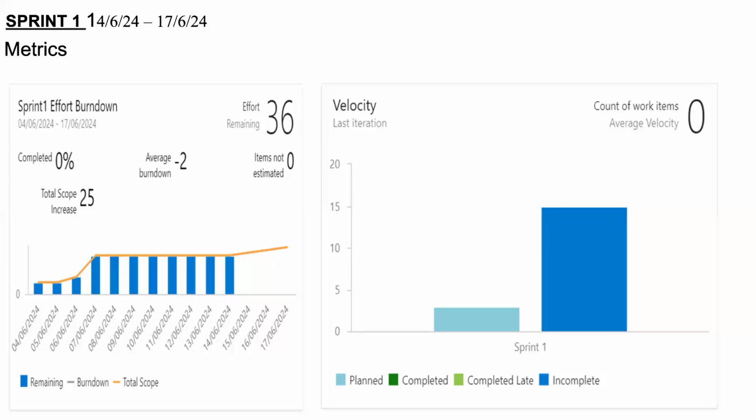As we can see, the effort bundle shows that the new PBIs were planned during the sprint planning, and more were added to the PBIs along the line in the sprint, but none was completed. This was because SMs were the developers and were new to the environment. The velocity chart shows that few were committed and more were added. However, none of them were completed.